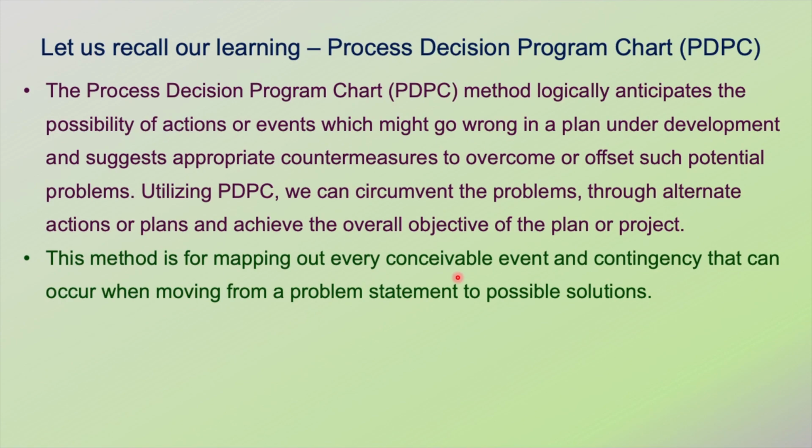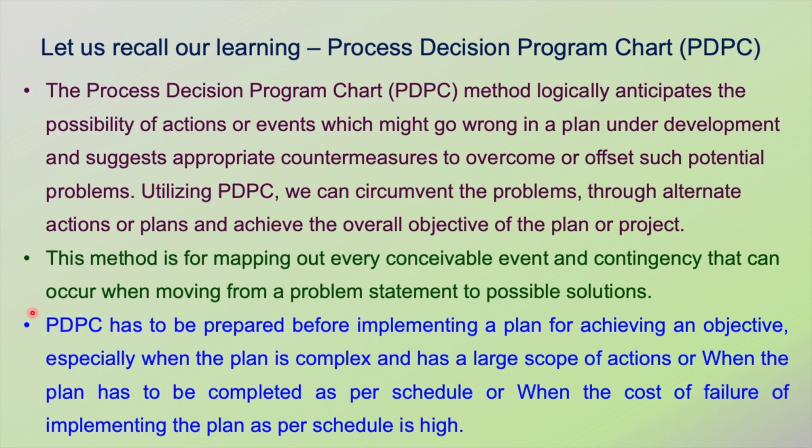So by doing this method, we are identifying whatever can go wrong and contingency that can occur when moving from a problem statement to possible solutions. When we are executing a plan, what all the things can go wrong? If such things happen, what can we do? So PDPC has to be prepared before implementing a plan. So essentially, before implementing an objective or a plan, we have to do PDPC.